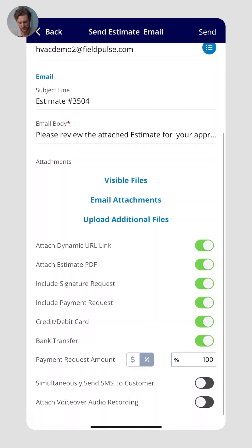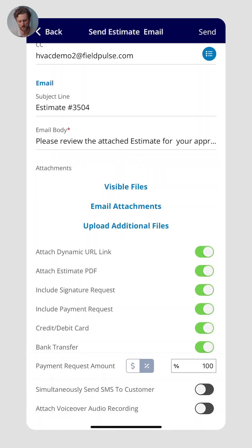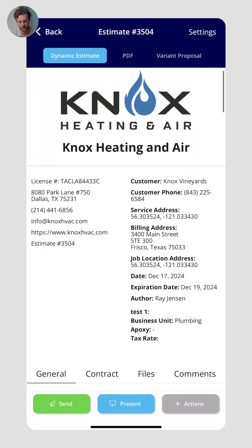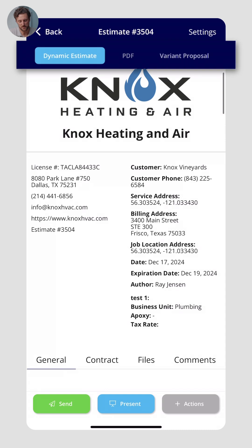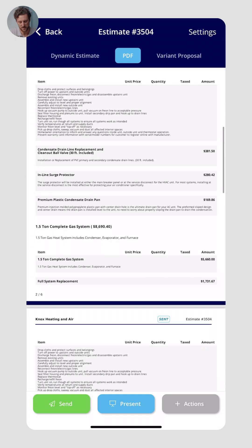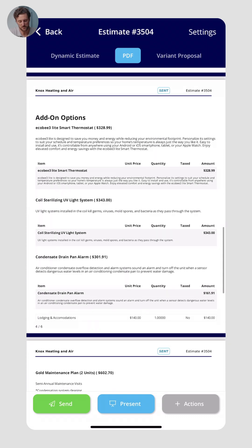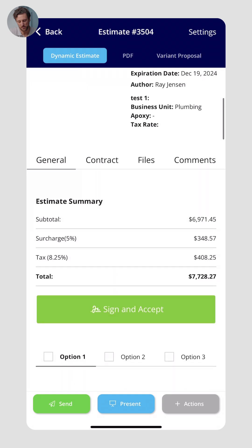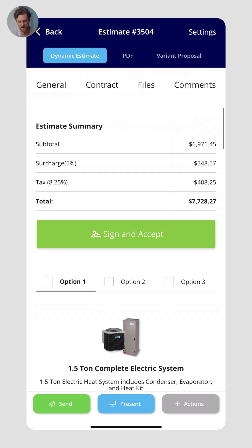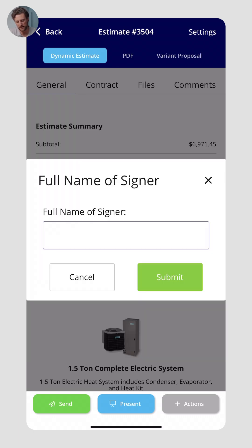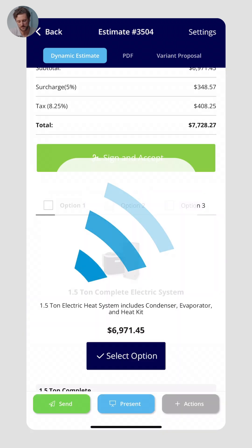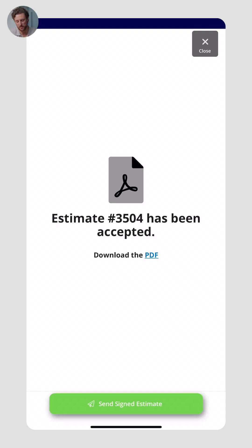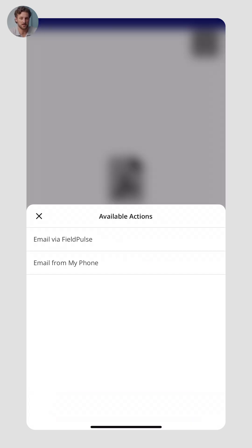I can include a payment request and even select a down payment — for example, a 20% deposit. In this example, I'll do 100% of the payment and click Send. The customer will get an email or text and be able to pay right there. They'll receive what we call the dynamic estimate, or a traditional PDF is available as an option. They can see the full breakdown, sign and accept right there in person by typing or drawing a signature, then enter their name and submit. Depending on your configured payment options, you can then collect payment and send a signed version of the estimate for their records.